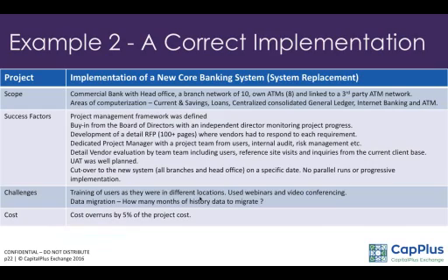The success factors were that the project management framework was in place. The board of directors had the buy-in, and they assigned an independent director to monitor the project process. So basically, this director sat on the project steering committee, where they put in a lot of time to ensure that things are done at the right time. Staffing was in place, all the resources were in place, and that helped the project manager immensely.